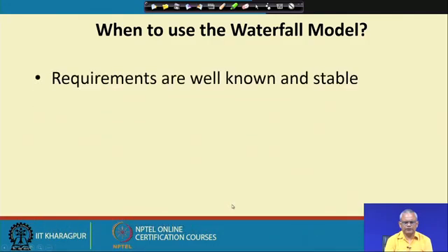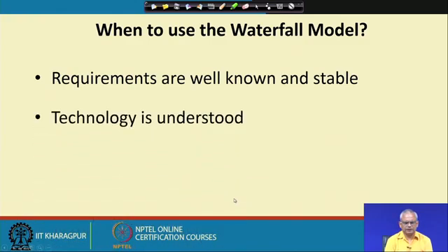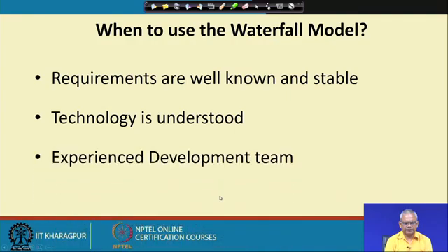The waterfall model is used now also for projects which are well known. The development team is very familiar with this kind of project, they have done many projects, the requirements are known and stable, the technology is understood, and the developers have done this many times and are experienced in developing this kind of project.